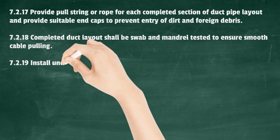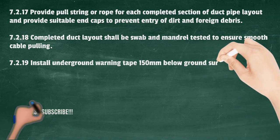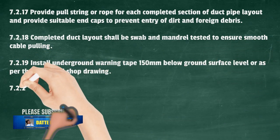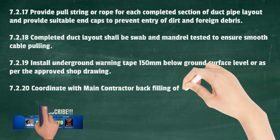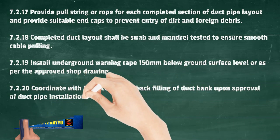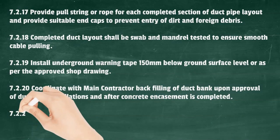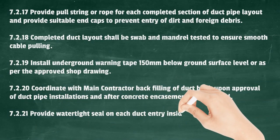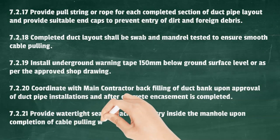Install underground warning tape 150 mm below ground surface level or as per the approved shop drawing. Coordinate with the main contractor for backfilling of duct bank upon approval of duct pipe installations and after concrete encasement is completed. Provide a watertight seal on each duct entry inside the manhole upon completion of cable pulling works.